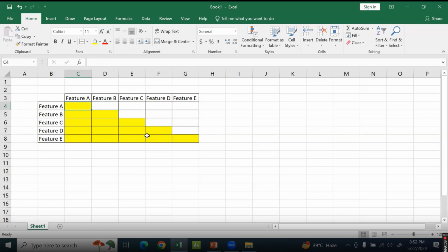So what we do is we create pairs and we ask which one is more important. We just compare two values to see whether this is better or that is better. The team will discuss. Right now, when we compare feature A and feature B, which one is more important? The team will discuss; they're all technical experts. They believe that if we compare A versus B, A looks more important. So it's a very simple, very lightweight method. We do two comparisons at a time, paired. That's why it's called paired comparison.